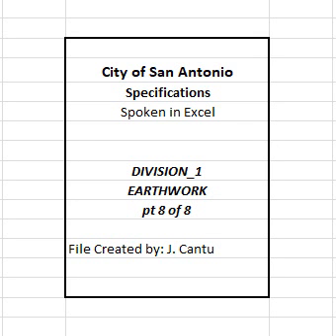Sprinkling and rolling, except proof rolling, will not be paid for directly but will be subsidiary to this item, unless otherwise shown on the plans. When proof rolling is shown on the plans or directed by the engineer, it will be paid for in accordance with TxDOT Item 216, Proof Rolling.